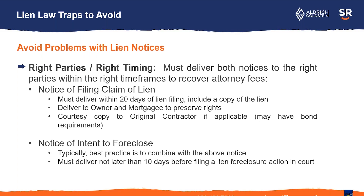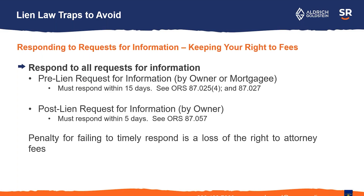You want to make sure that you have the right parties and that you've provided timely notices. After you file that lien, you've got to deliver your notice of filing within 20 days. Combine your notice of intent to foreclose — you have to do that at least 10 days before you file the foreclosure lawsuit itself. Best to do them both at once, and that's what most people do.